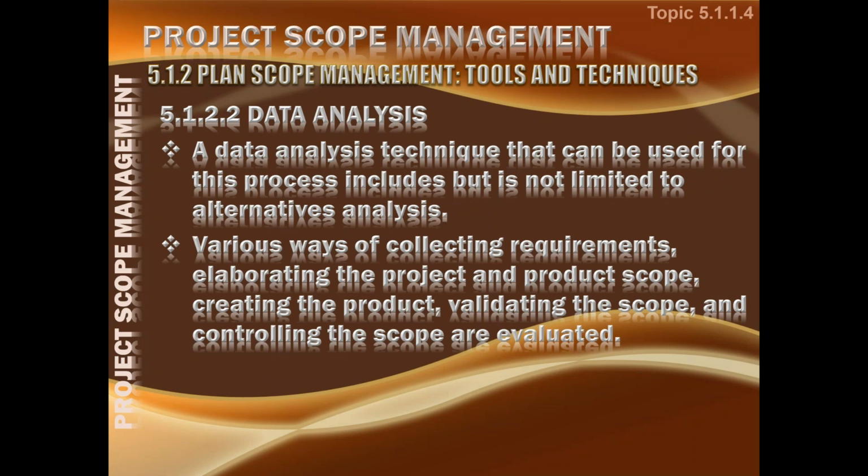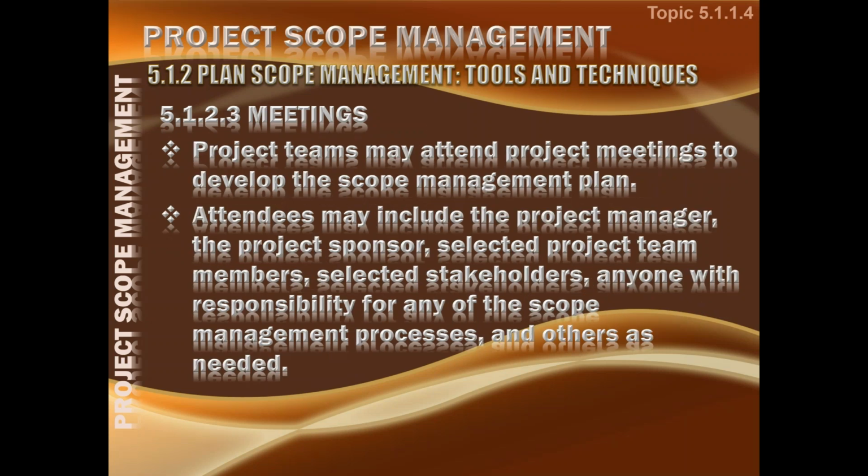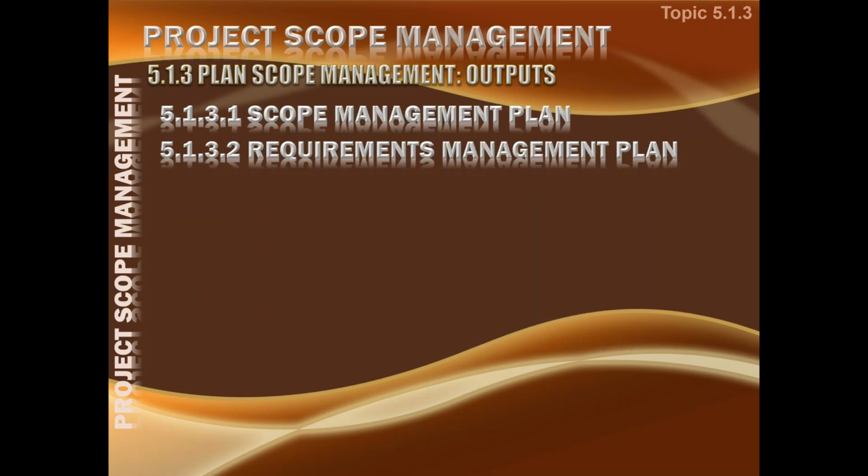Meetings are a standard way of creating any management plan. The project team sits down. They may attend project meetings to develop the scope management plan. Attendees may include the project manager, project sponsor, selected team members, selected stakeholders, anyone with responsibility for any one of the scope management processes, and anyone you further require to be present in these meetings. As a result, we will get two things: one is a scope management plan and one is the requirement management plan.